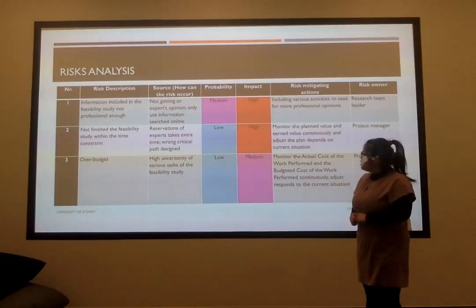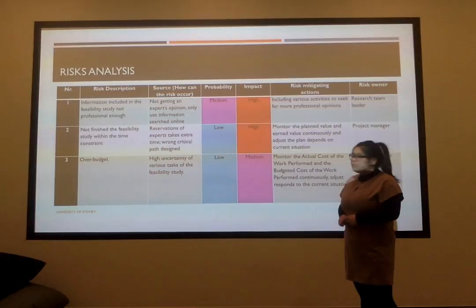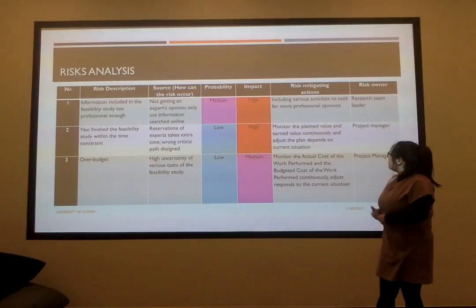Another risk is that the information included in our visibility study is not professional enough, and its impact is high. So we think to include some expert opinions and not just search online to solve this risk.